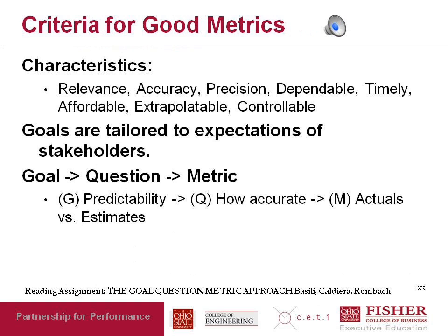So the previous slides talked about how to do linear estimation, what to measure, what calculations to make, things like that. But keep in mind that there are many reasons for doing this kind of estimation, and figuring out the total cost is only one of them. The other reasons are things like trying to understand how close your projected levels of effort are coming to actual levels of effort, or at what rate your cost is accruing as opposed to what the total cost might be.